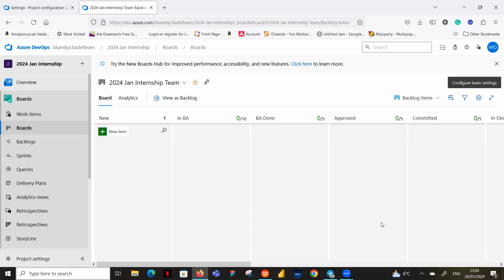And as a Scrum Master guiding the team to work with the Scrum process, you're able to guide them through. So if the BA says, oh, it's because I've not reached out to the PO, or I'm waiting for the PO to approve, you can push also, get in touch with the PO to say the sprint is almost over, we're moving towards the time when we need to refine the stories that are in approved in readiness for the next sprint.